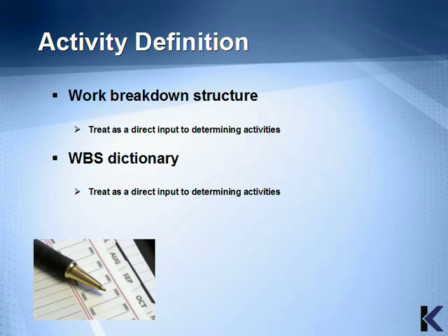To make sure time is allocated for all the work to be performed, use the work packages from the Work Breakdown Structure and the Work Breakdown Structure Dictionary, which will help explain them, to estimate the time for each project activity.